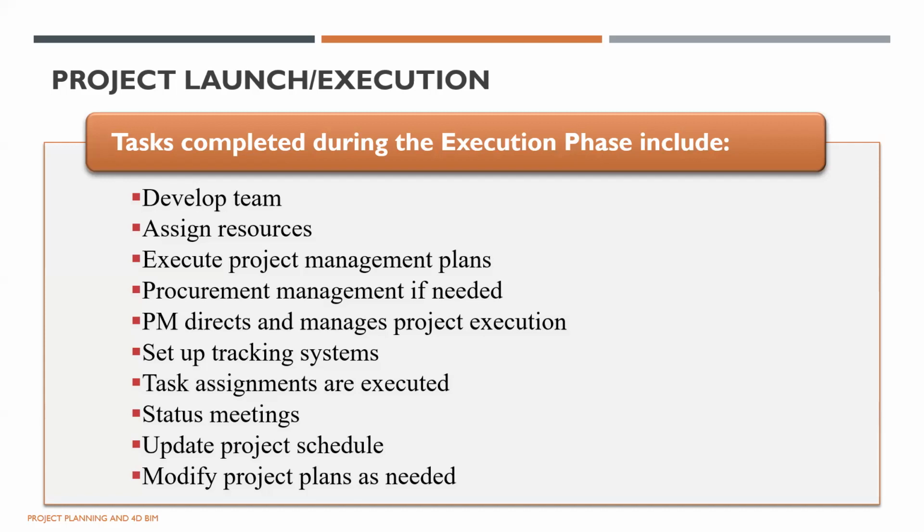As I told you, during the construction there are 3 kinds of meetings we hold. In the initial stage we conduct the pre-bid meeting. Before the tender submission, we call our bidders to come, and if there are any clarifications on the bid, we give the clarification, and only after that they submit the bid. This is before selecting a suitable contractor. But once a contractor is selected, at that time we conduct the kick-off meeting. And finally we have the project close-out meeting. These are the 3 main meetings.